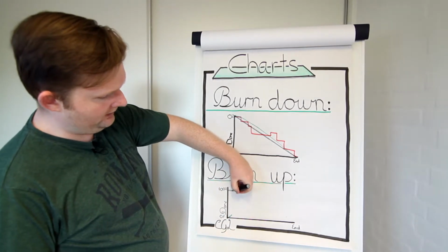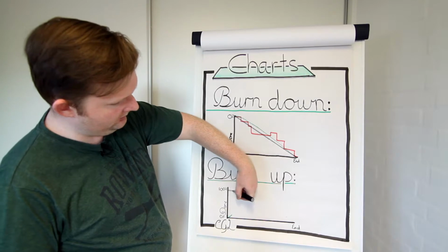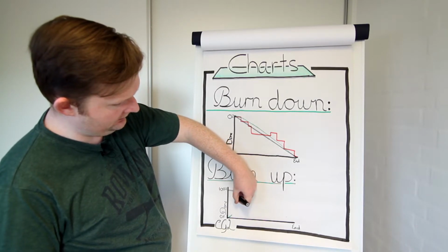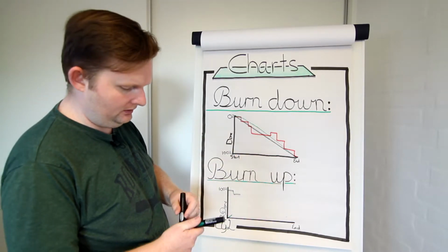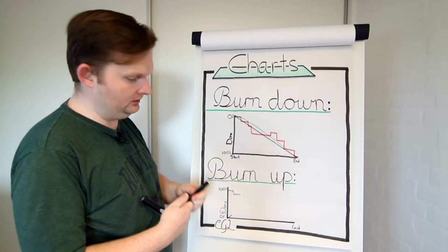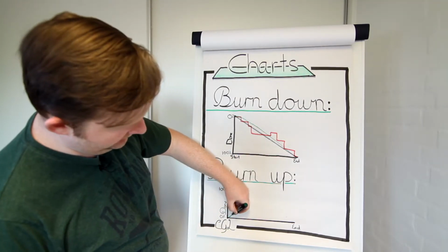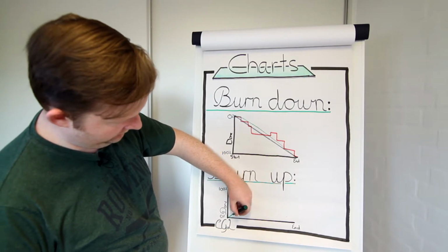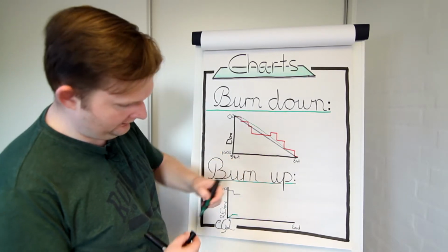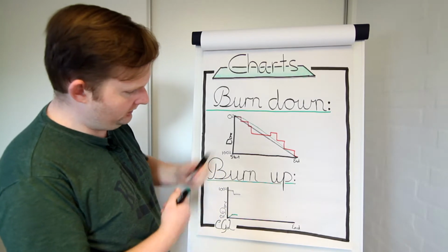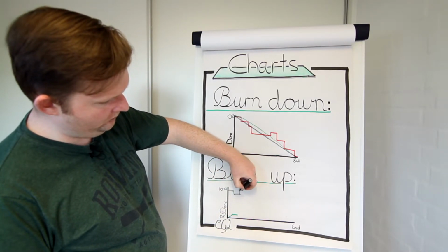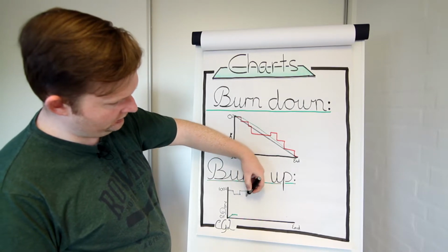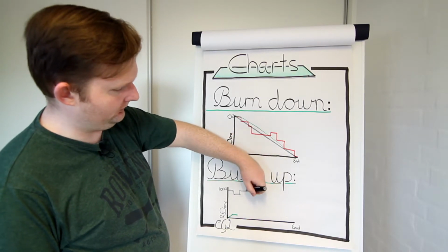Then we might figure out that we can actually pull something out of the sprint, in the sprint, that is not necessarily going to be done. That changes what our 100% is defined as, and then it might be that we did not finish anything else at that same point. But in this way, we can always see what happens with the scope of the sprint, other than just that we did minus work.